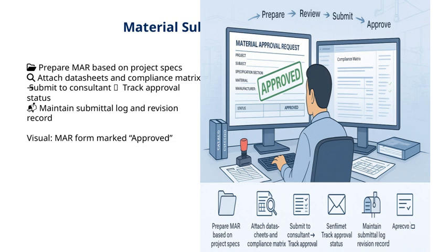Next, it's important to attach all relevant datasheets and the compliance matrix. These documents provide detailed information and confirm that the materials meet the necessary standards. Once you've compiled everything, submit the MAR to the consultant and keep track of the approval status. Monitoring this process helps you stay on top of deadlines and any comments or revisions needed.